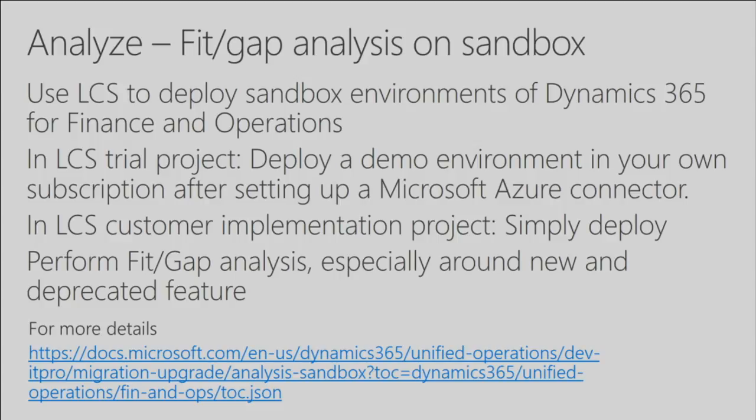So the stage before the last of your analyze is a fit gap analysis. At this stage, you are deploying a finance and operations environment, and you are looking at the deprecated features, seeing what you need to do. You're doing a fit gap analysis to figure out what to do in this new AX7 world. You're also looking at features that are new in finance and operations or AX7 and comparing them with existing customizations you have, possibly leading you to delete existing customizations in AX2012 because they're either obsolete or not needed anymore, and so on.